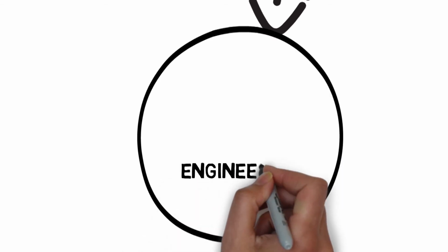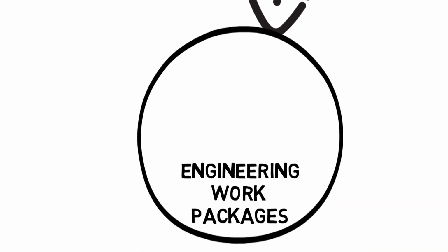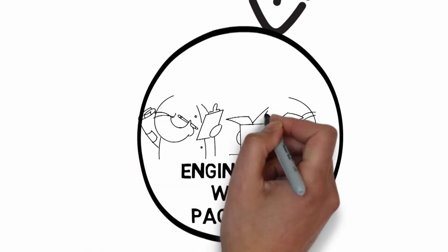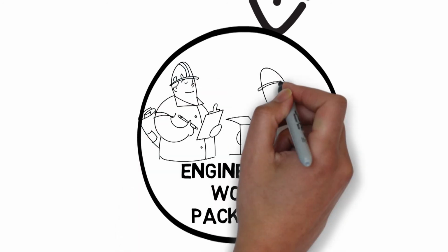The engineering team is then responsible to create and deliver whole engineering work packages that satisfy the schedule and ultimately the requirements of construction work packages, measuring engineering deliverables from the ground up, just like real-life construction requires.